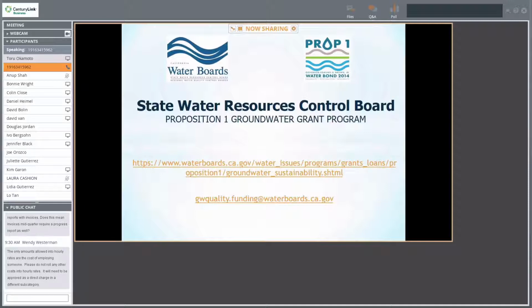And also like a project title. A lot of times we have seen invoices from subcontractors that don't have a project title on them, so it will be nice to know which project this invoice belongs to, in addition to the breakdown of the tasks, like Megan mentioned. Okay. So as long as they identify the work done and completed and the amount of hours and the dollar amount, that should be sufficient. Yeah. Okay.